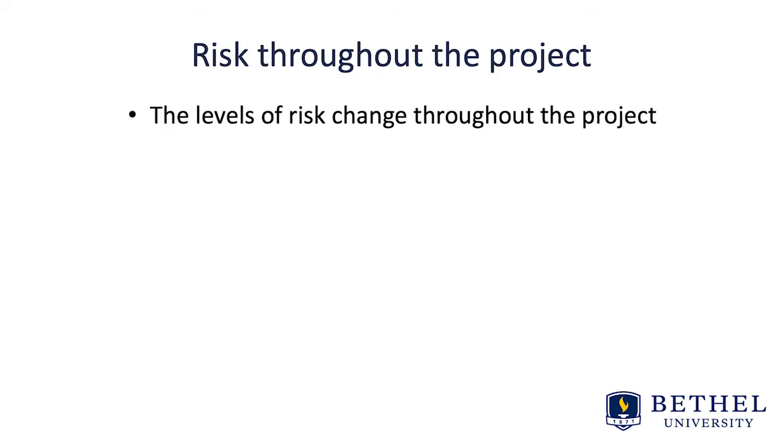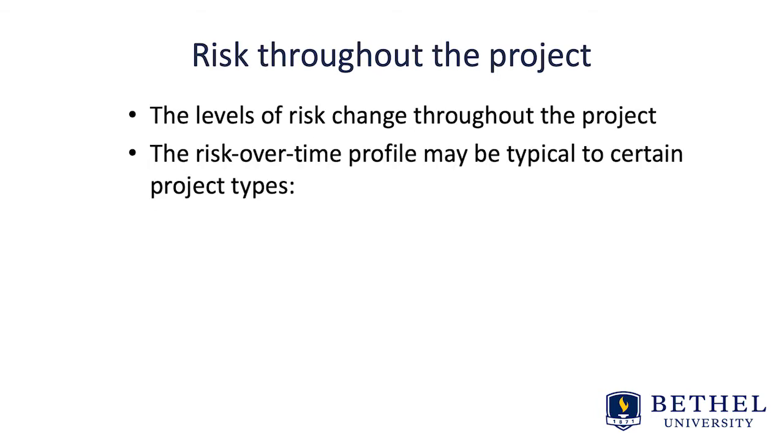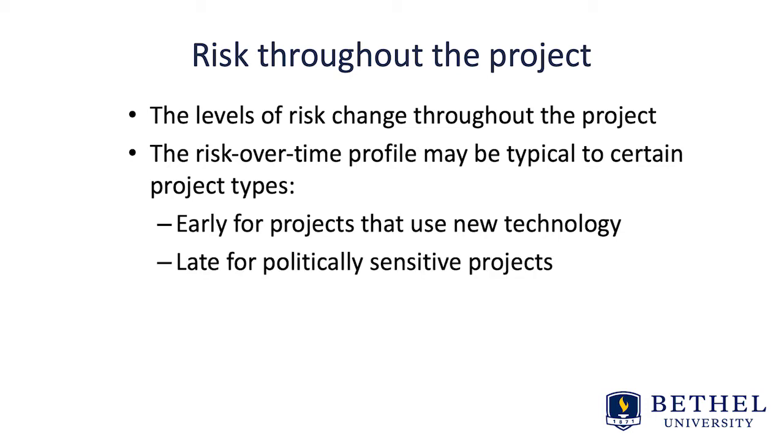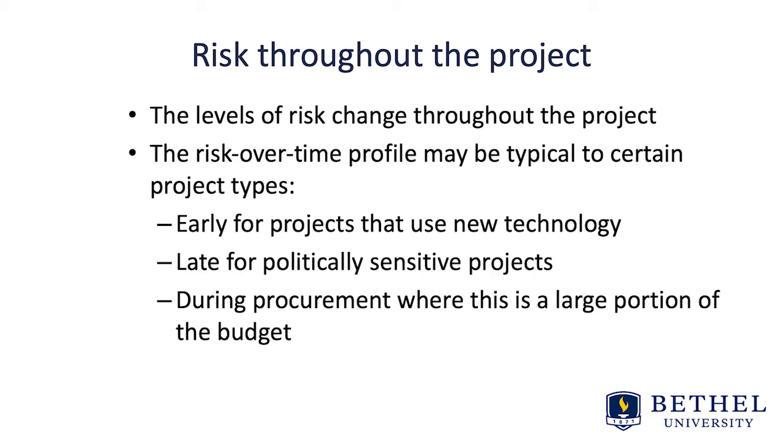The levels of risk change throughout the project. The risk over time profile may be typical in certain project types. Early for projects that use new technology, late for politically sensitive projects. During procurement, this is where a large portion of the budget occurs. So when we're talking about risk, this is where we like to focus.